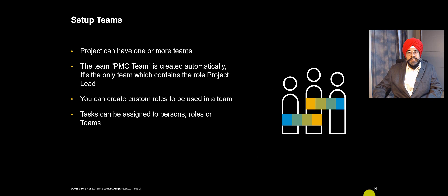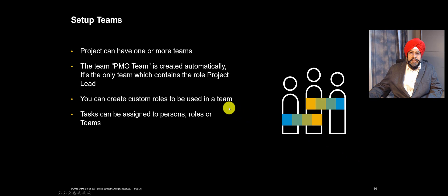You can also set up teams. One team called the PMO team is created by default but you can add more teams if you want. Teams constitute of roles and you can have person assignment to these roles. The standard role list is coming from SAP Activate methodology but if you find it insufficient you can easily extend the definition by adding custom roles. The important point to note is task assignments — tasks can be assigned to persons, roles, or teams very easily, and that can also be changed later.